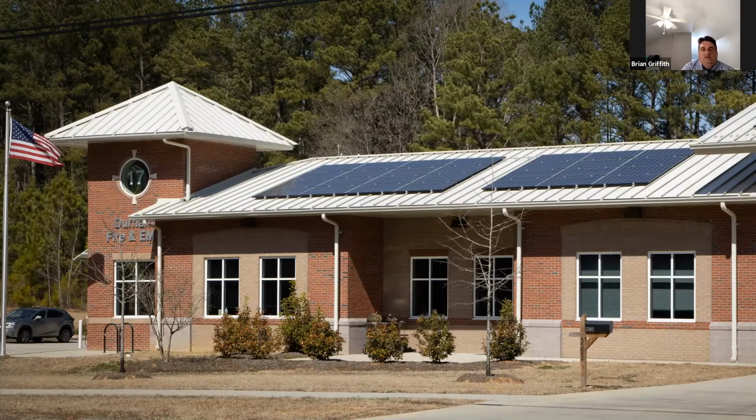As Blair said, solar panels were not part of the original budget. We had a tight budget. We had a tight time frame. We had tight constraints in terms of the site since it was wedge shaped. So we made sure all of those components were utilized to the best of our ability, and also planned for that future, which allowed those upgrades to be made. Luckily, we had a good project that ran on time, and we were able to speak with the city in terms of installing those solar panels, upgrading the project from a LEED silver to a LEED gold.